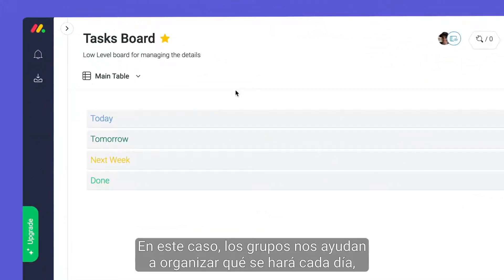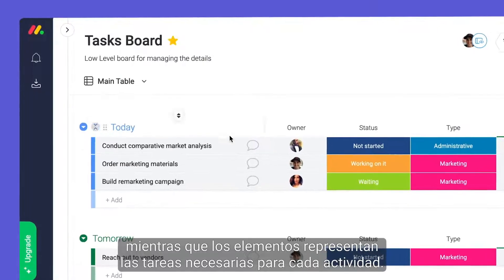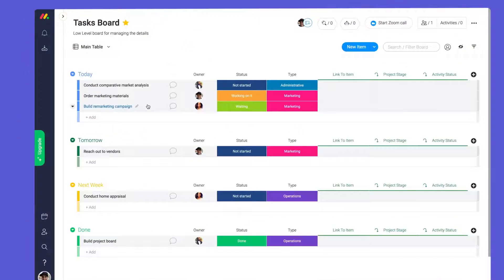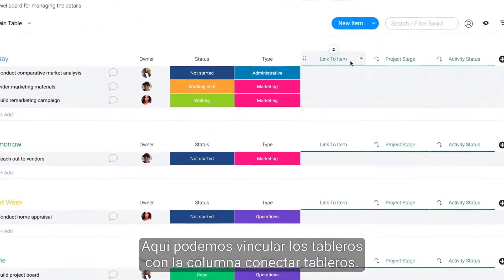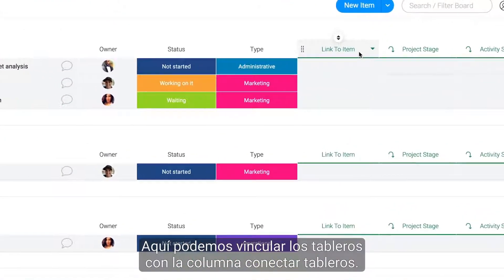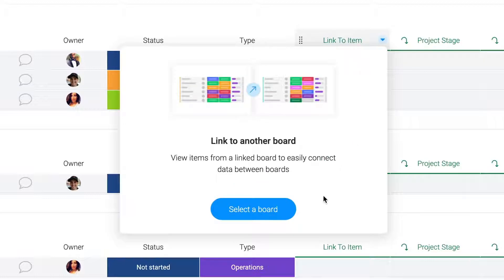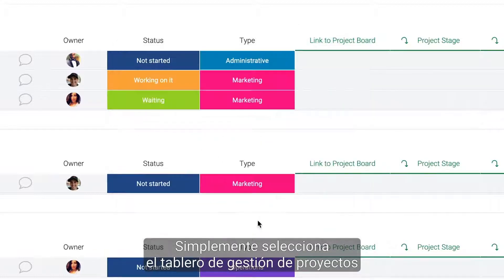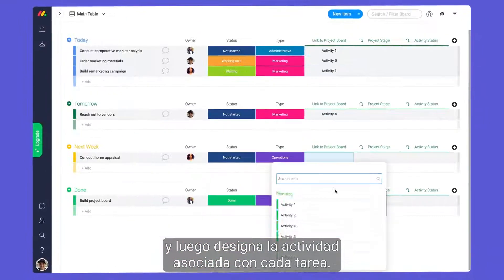In this case, groups help us organize what will be done each day, while items represent the tasks needed for each activity. Speaking of activities, here we can tie our boards together with the link to item column. Simply select your project management board, then designate the activity associated with each task.